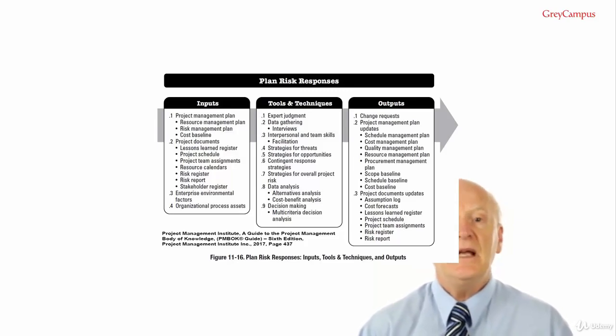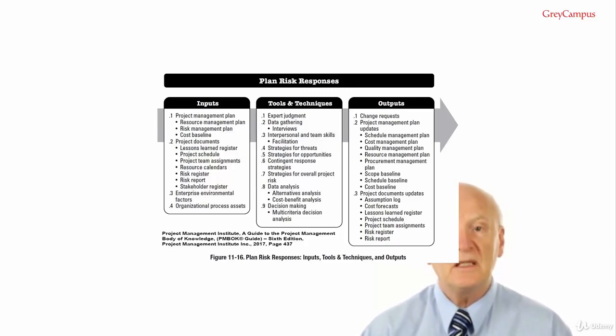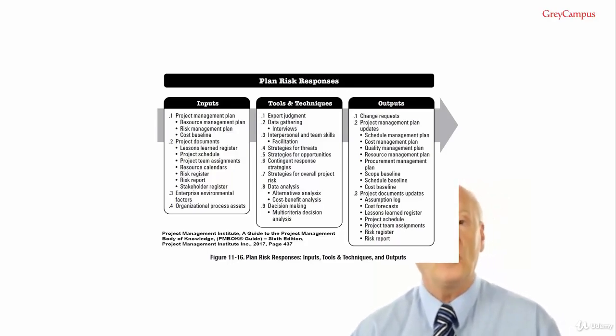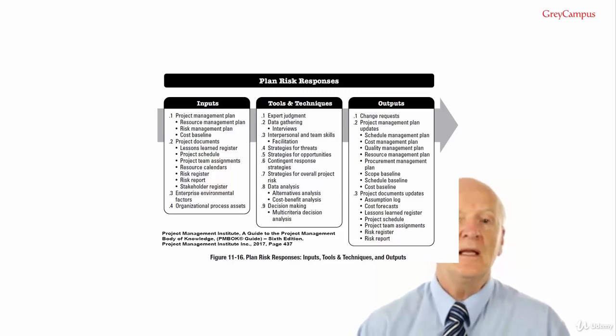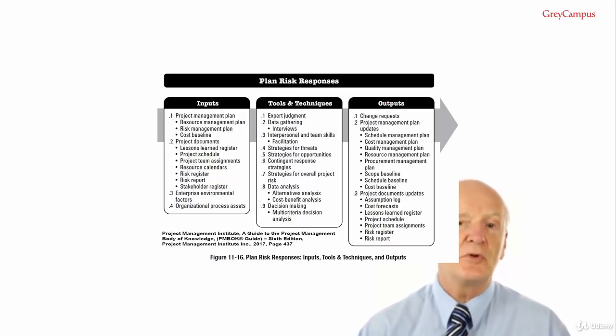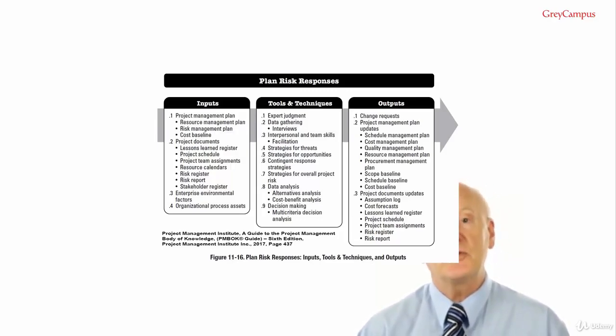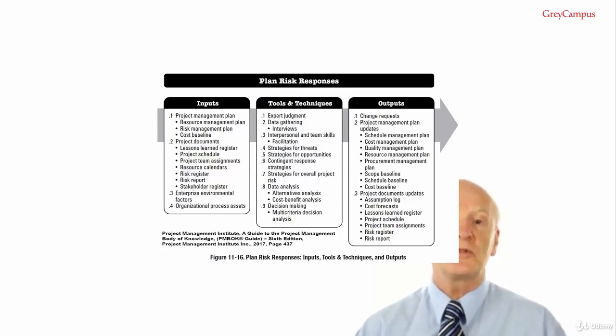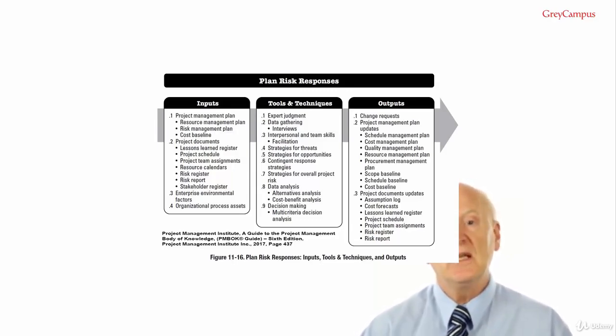Enhance. The enhance strategy is used to increase the probability and/or impact of an opportunity. Early enhancement action is often more effective than trying to improve the benefit after the opportunity has occurred. The probability of occurrence of an opportunity may be increased by focusing attention on its causes.